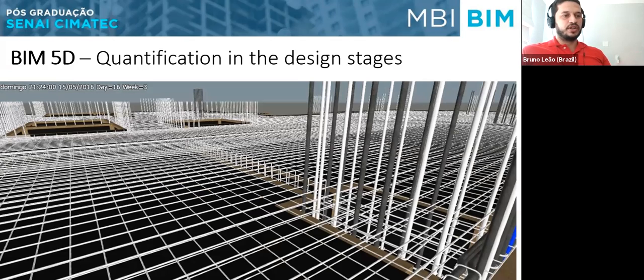But we could analyze, and as a type floor, a type project, it would be repeated vertically. We could be sure that the problems and the budgets that we find here, we only had to replicate vertically by the number of floors.